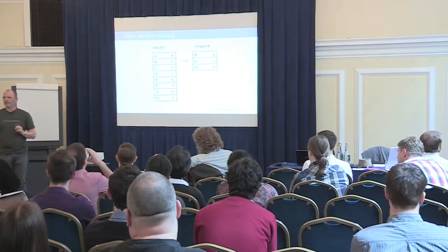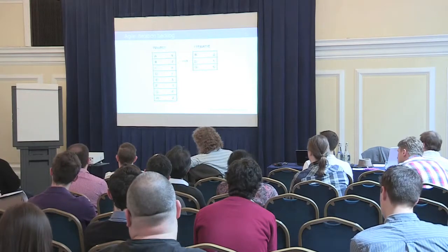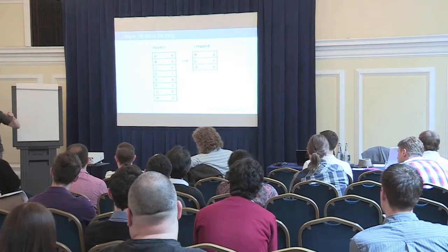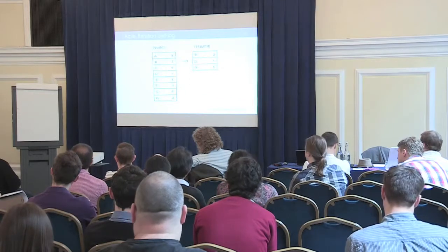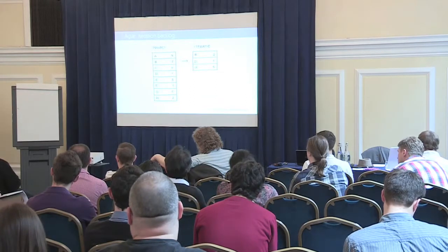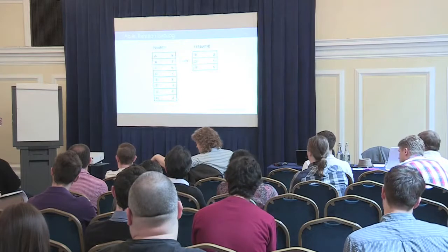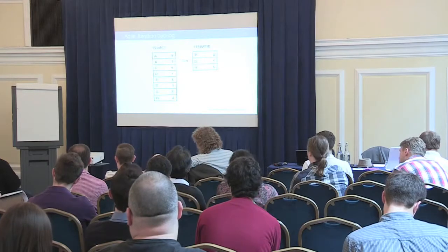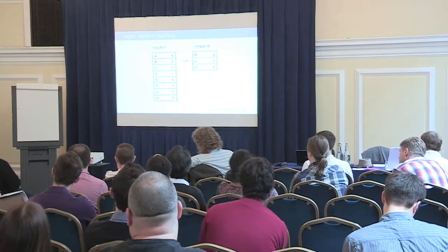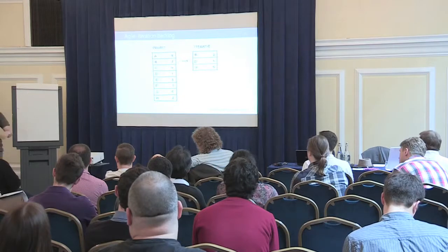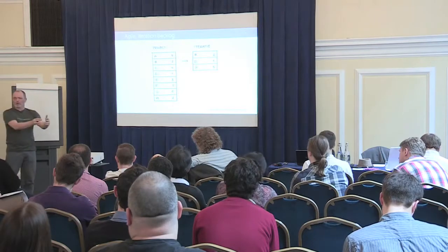Having too much work in your iteration also doesn't work. Why? Well, basically, if you do that a few iterations after each other, people will get demotivated. I actually did sort of a social experiment in a project once, where we said, okay, this is the amount of work that we want to do during this iteration, knowing that it was a little bit too much, because we were just interested in how the team would respond. Their first reaction was, we cannot get the work done. The iterations need to be 3 weeks instead of 2. And I was just like, okay, we're not going to do that. So we did that 3 iterations after each other, and they got really demotivated. So the conclusion I drew from that is that if you put too much work on a team, they will be unhappy.